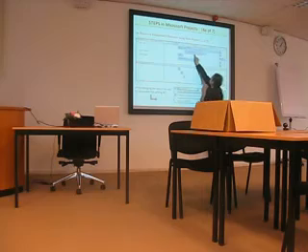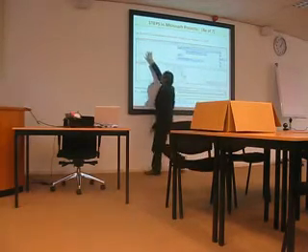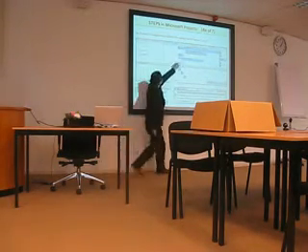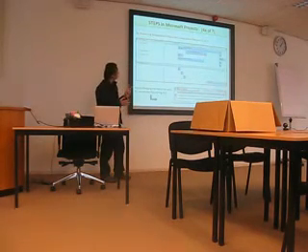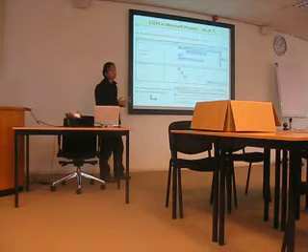Can you see this one? It means over-allocated to this person: 8 hours, the same day, same time, doing more than one task. Over-allocated.